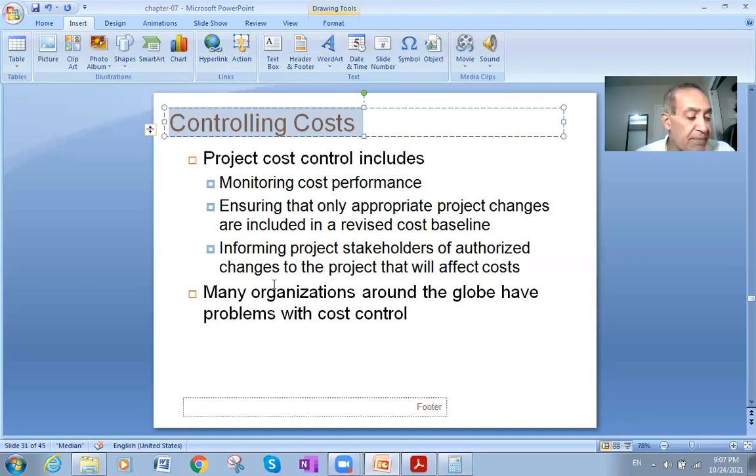Now, I'm saying with this watch as an example, I will produce this watch for the cost of $10. Okay, I put the standard that the cost per watch is $10, that it will cost production of $10 in the project for producing one watch, one wristwatch like this. Okay, $10. Now, when I came to see, the cost was $13. The cost was not 10, but exceeded the 10 and became $13. So in that case, this is a negative deviation.